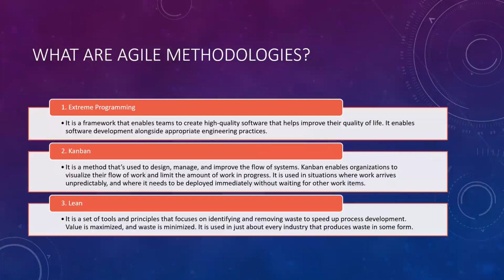And after hitting 2 weeks, we did not complete 2 requirements. We have spillovers, like 8 requirements are completed and 2 requirements are not completed. So in case we are selecting Kanban, we are going to consider those 2 requirements in the next release. We have decided we have 10 releases, and in each release we are going to take 10 items at a time. Okay. So 10 items in one release, 10 items in the second release, 10 items in the third release. Likewise, we'll be deciding 10 releases, so 100 items should be rolled out.